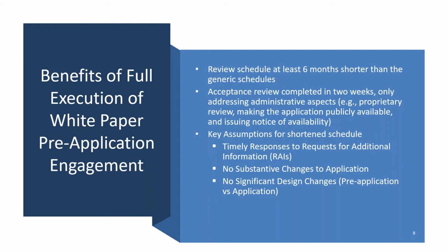Well, because we went through a comprehensive look, using our experience in licensing, as to what are the key elements, both from a safety review and environmental review, we are saying that if you, as a vendor, execute all the activities laid out in the paper, it will allow the staff to offer review schedules that are at least 6 months shorter than the generic schedules that we have identified as part of the NEMA for the different licensing actions, such as COLs and DCs. And you can find those generic schedules on our public website.